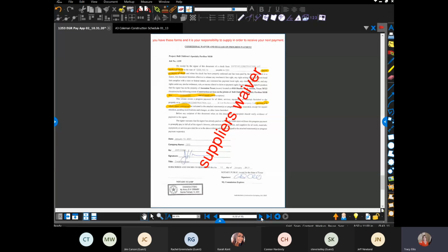These need to be the total amount due or paid to your supplier, subcontractor, rental company, and so forth, through the end of the month we're going to be funding. Again, it's a little bit too much to go into at this point, but if you don't understand or you just need clarification, please, please, please call me.